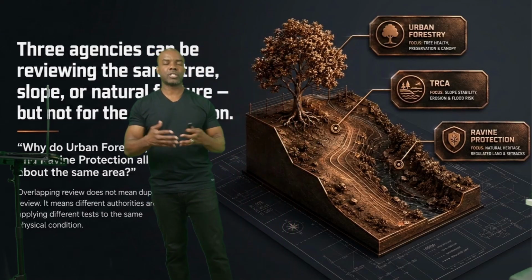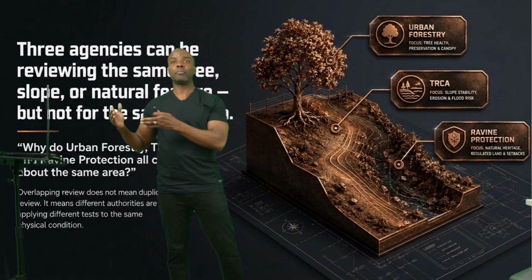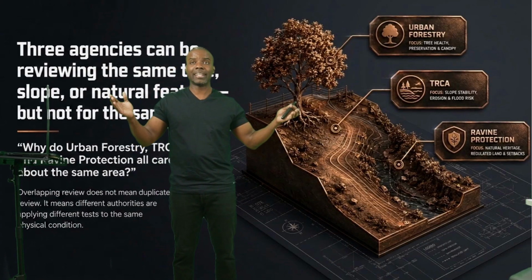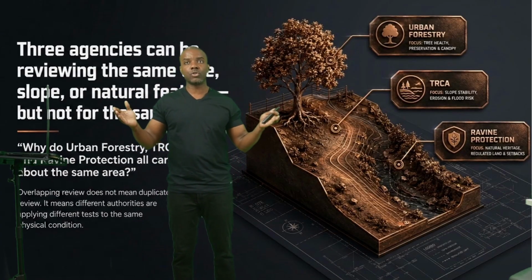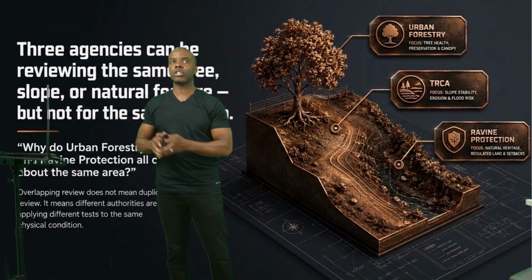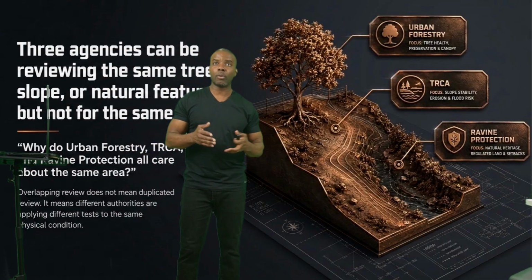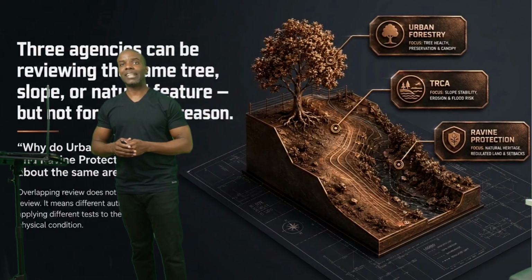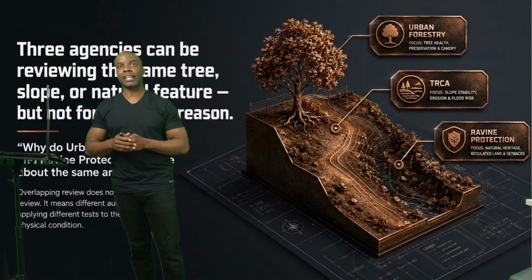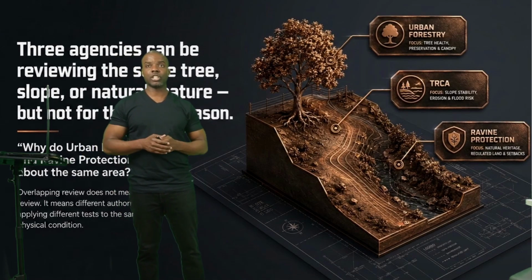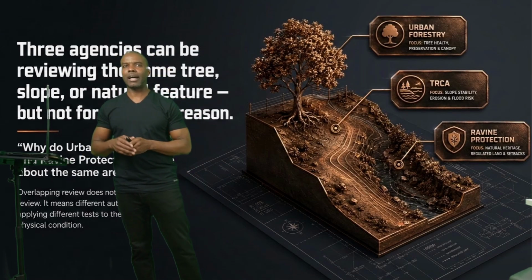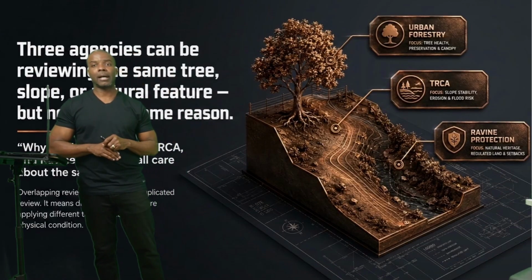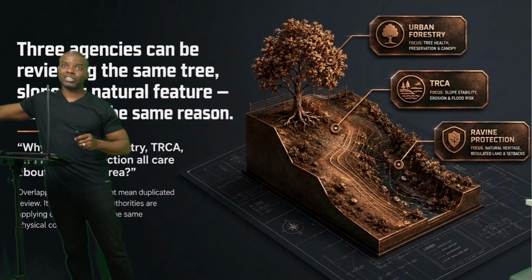So essentially, if you purchase a building, and again, this is where I'm going back to verifying, making sure I verify the zoning, verify that the use of the building is what it is. If you intend to change the use of a building, let's say from a mixed use to a residential use, keep in mind that as you go about doing that, it will require that you address the need for a record of site condition, right? Once you start changing the use of a building. This was something that we encountered, and this is something that most people don't really think about, but it's something that can certainly dampen the outcomes on a project and take a lot of time.